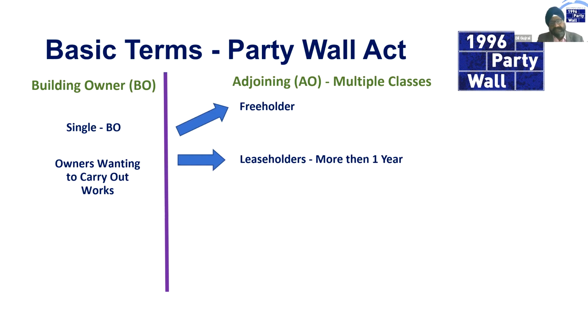And this is particularly a situation with commercial buildings. You'll find shops sometimes have leases of less than 7 years. They don't register on the land registry, so they can miss out. The only way to deal with that is to get the freeholders to pass on any notices and notify the Party Wall surveyors, or the people serving the notices, that these parties are also notifiable.